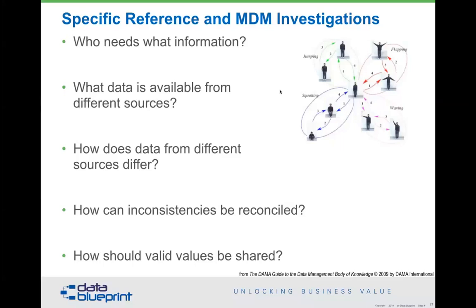When we know something is good, I like to do it in a way that says, look, if you're moving to cloud or moving from one system to another, put the data in the new system that's been cleaned. Don't put the dirty data in the system. And yet time after time, this technology-first approach builds the data warehouse, spends all the money, nothing left over for training, and oh, by the way, we're going to forklift the existing data into the new system. Well, if you forklift anything into an MDM system, it is a recipe for disaster. People are told that the MDM has better data in it, and if you show them that it has poor quality data, but we're going to clean it up later on, they will not lose faith in the data, they will lose faith in the MDM solution.